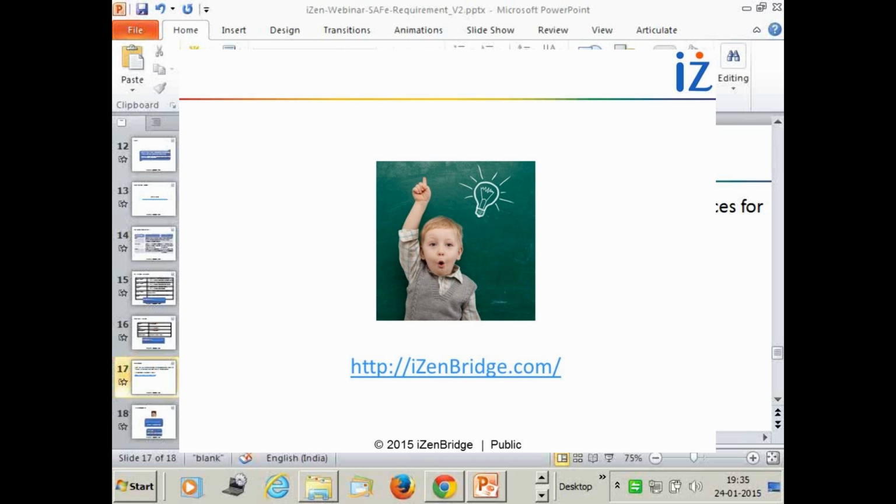Now the same concept, more or less, that having Scrum of Scrums. So Scrum of Scrum is also available in SAFe. It is recommended to be like a ceremony, which at least we should be doing once in a week. That is how the teams have been doing, and they would be doing a few more things which help them bring an alignment. So SAFe has introduced some more roles like release train engineers, product management, who work at a program layer only. You can think of release train engineer as more or less like a chief Scrum master. So it's just a framework. You may have multiple ways of implementing scaling, and if your current scaling framework, whatever you have defined, is working for you, it's good. You don't have to.